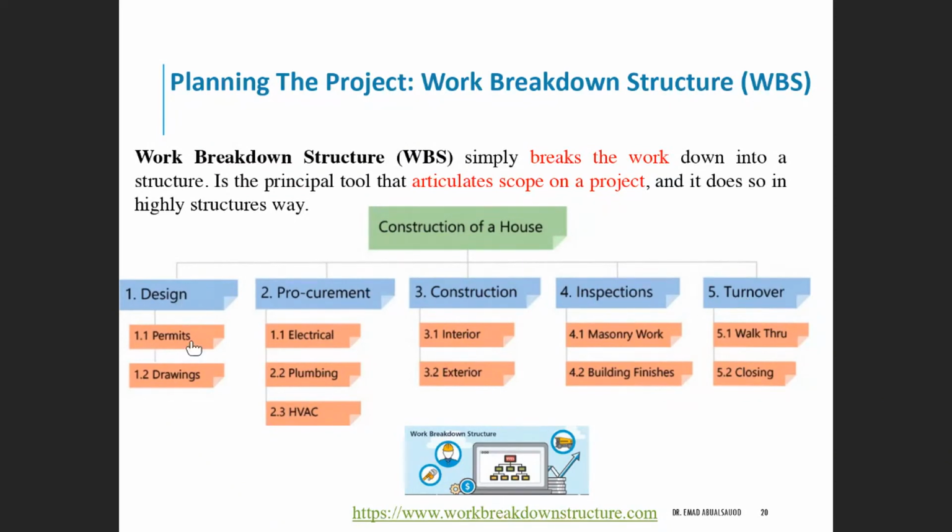For the design, we have permits, drawings. The procurement, we have the electrical, plumbing, HVAC, all these procurements and special equipment for the infrastructure of the building. The structural construction, the structural part, you have to work on the interior and the exterior.